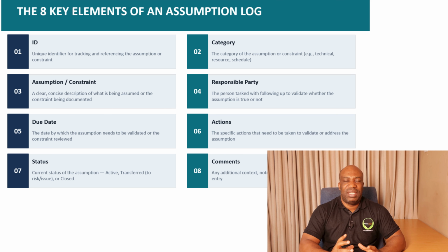So there must be a due date. That on a specific date, you must have validated this particular assumption. You must have either validated and closed it, or you validate and move it to become a risk. So that is very, very important to also put through.